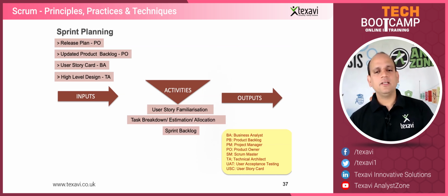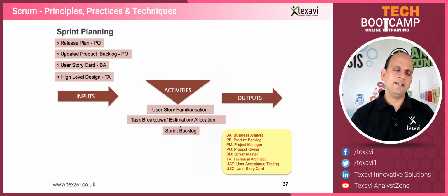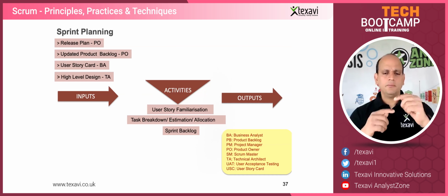But the team could go through each of those stories, get themselves familiarized with what the stories are, and then they say, no, you know what, that's not really possible. It's not feasible. We don't have the skills for Angular or JavaScript at the moment. So I don't think we can do this story. This requires a database connection and things like that. We don't have that yet, so we can't do this. But the rest we can do.